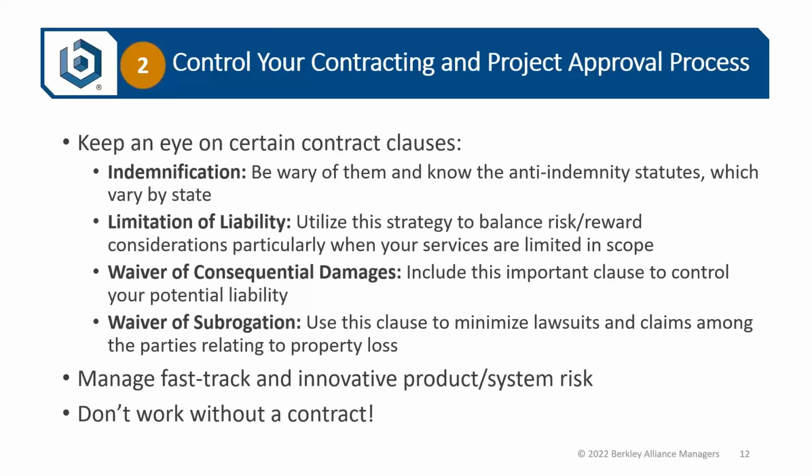So if you're bidding foundations and structural steel before the building is fully designed, and you get the steel on site or you get a mill order and it's in fabrication, and then maybe one of the exit stairs moves, maybe some of the vertical duct shafts move, and maybe they don't move that much, but they move enough where it creates a change in the structural steel. And so that's going to create a cost. It's going to create a change order cost to that previous phase of bidding. The owner needs to be aware of it.